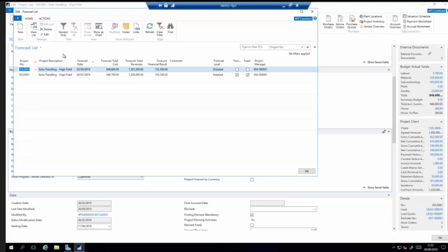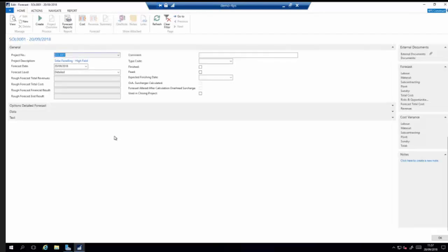So we're going to spend 100 hours next month, and 150 hours the following month, 200 hours a month after that. So there's different ways of doing the forecasting. This one I'm doing at the moment is based around the cost to complete. So we'll go into the forecasting screen. I've got my project number up here. I've got my forecast date.